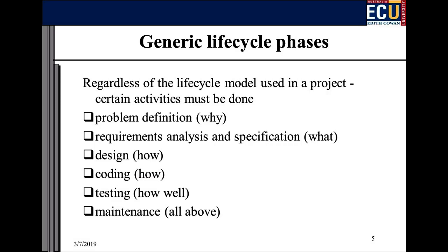And that's always given to you in the language of the client, rather than in language of software. We call it problem domain and solution domain. And your job, actually, in that stage of things, is to translate these requirements from something the client wants to a legally binding document called the specifications document, which says this is exactly what I'm going to deliver.